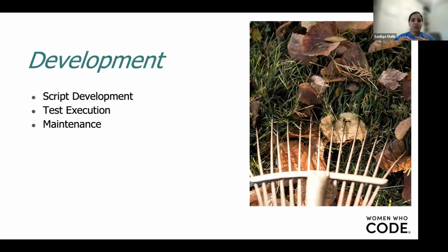So each sprint, when you're making an effort estimate for the time taken to develop your automation scripts, make sure that you set aside certain time for your test execution and maintenance.